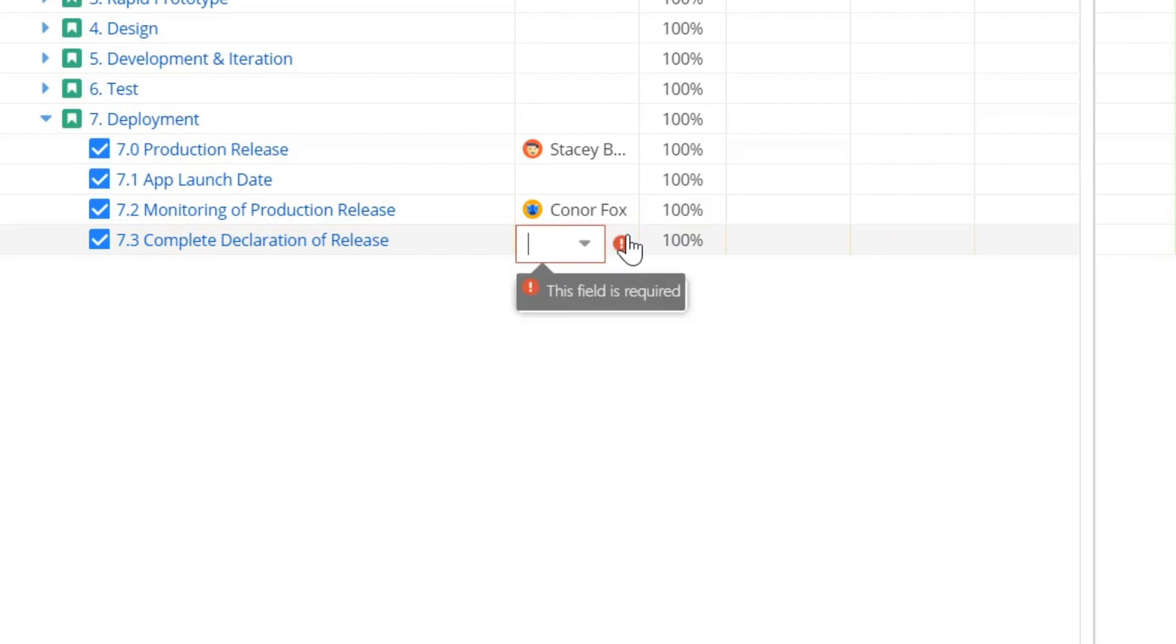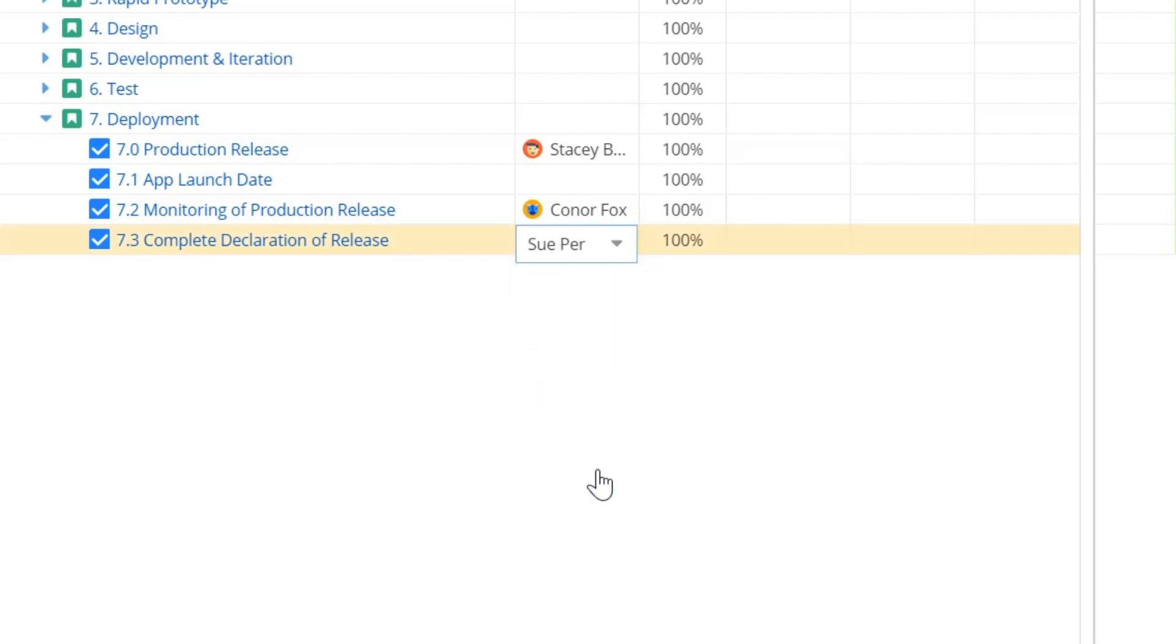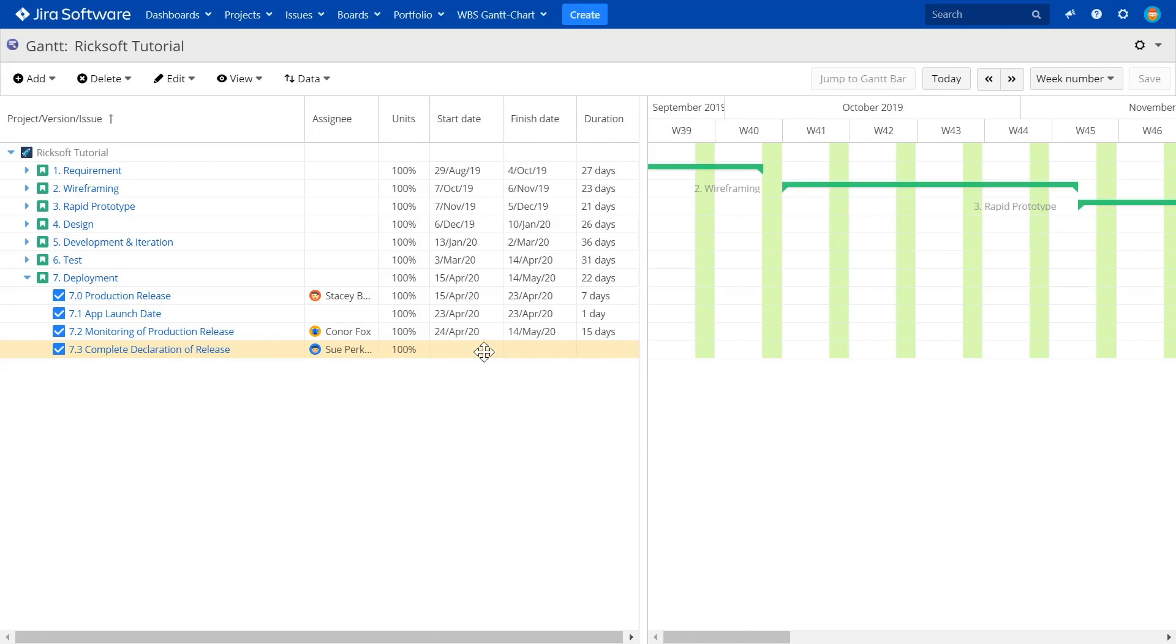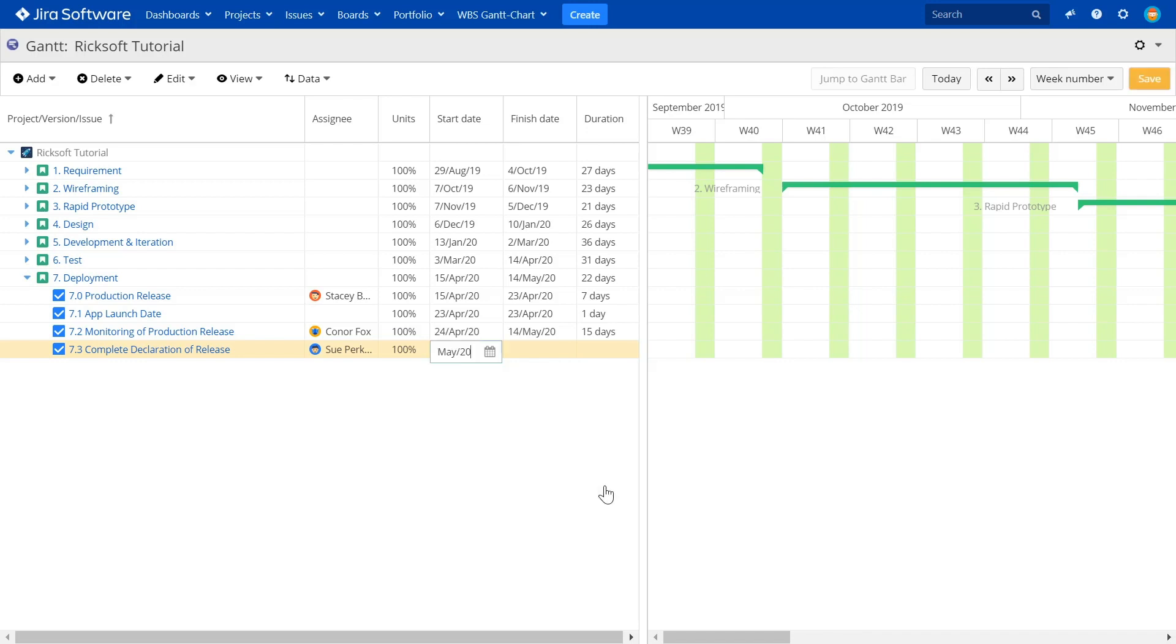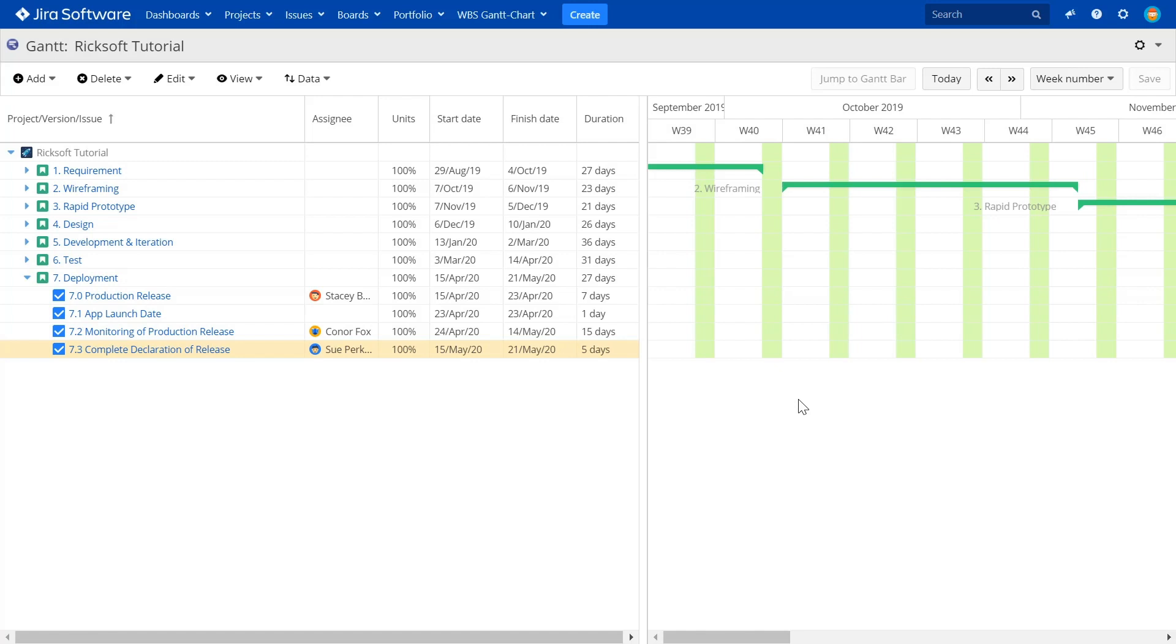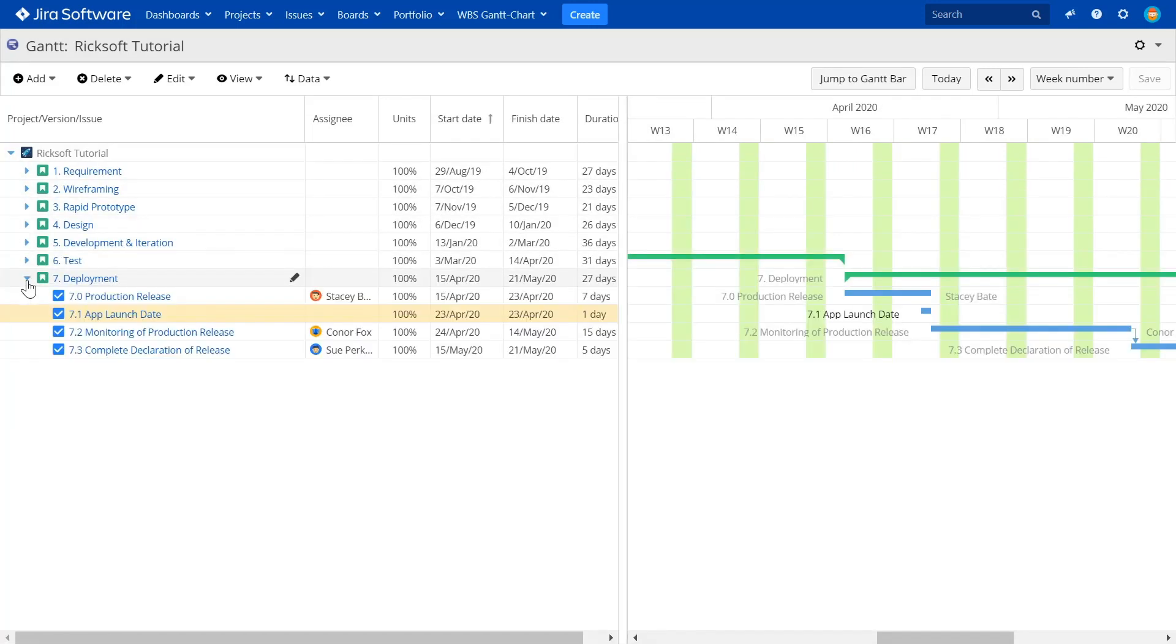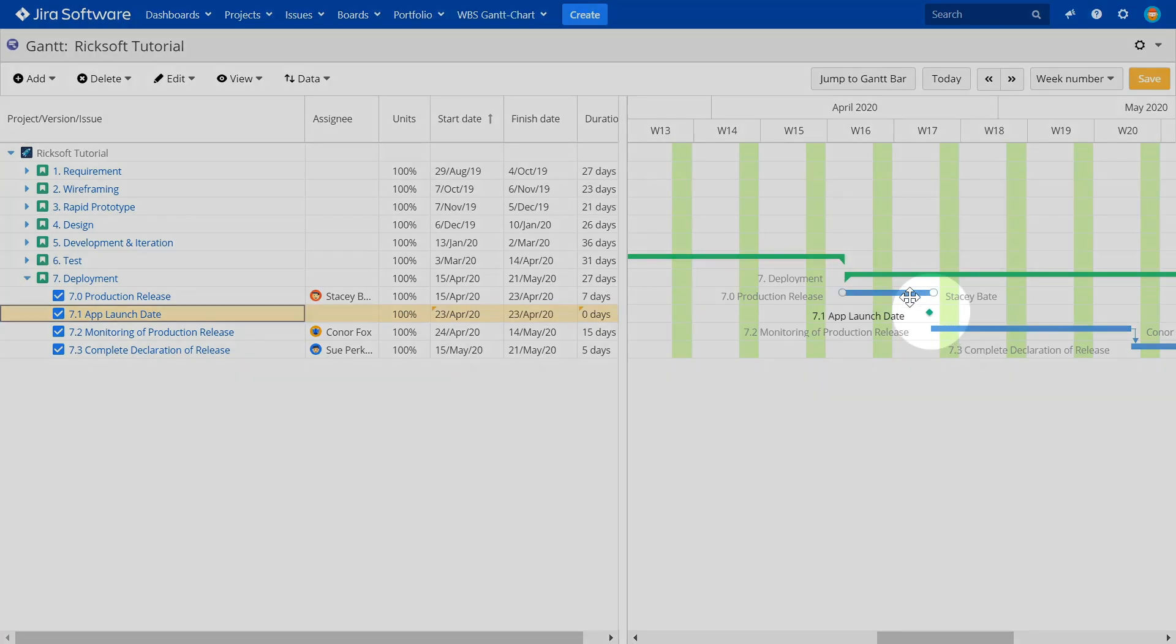And then assign appropriate team members to these issues. Add in the start and finish dates to all tasks to lay out your project timeline. Once you have all the issues in a hierarchical order, indicate the major checkpoints of your project. In the app, you can easily convert suitable issues into milestones.